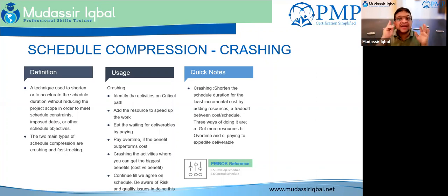Because if an activity is supposed to take 2 days, it has to be done in 2 days, because if you add a third day, the project will be delayed. Crashing only works on the critical path, where additional resources can shorten the activity duration.